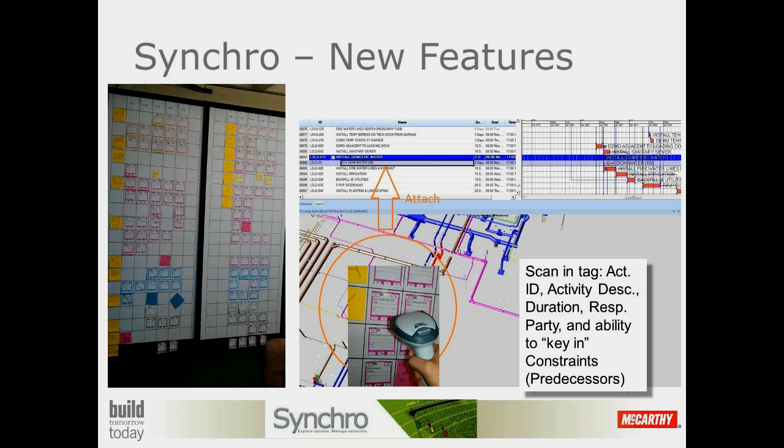But you also don't want to spend 4 hours rekeying Post-it notes into Excel, as an example, and then sorting out the data later. This works as long as you set up your columns correctly in the Gantt chart in Synchro, and define your user profiles along with the other data, so you can get custom fields, and then your barcode is read. And it even jumps to the next line. So if you have 300, how long does it take you, 300 gunshots? Then that's your data capture.